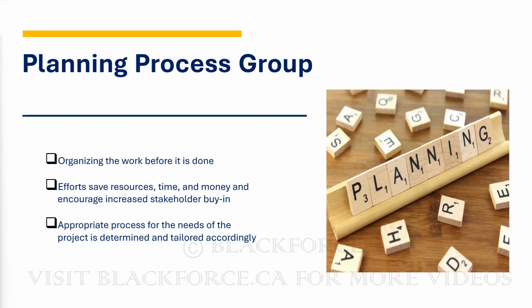What are we planning? We are defining the activities we want to do. For example, we want to hire people, right? So what are the things you need to do? You need to send out a job description, you need to get people in, you need to conduct interviews, they need to pass the interview, you need to send a congratulatory message. So you have those activities, you define those activities, you now sequence those activities, that okay, this must happen before this, this must happen after this.